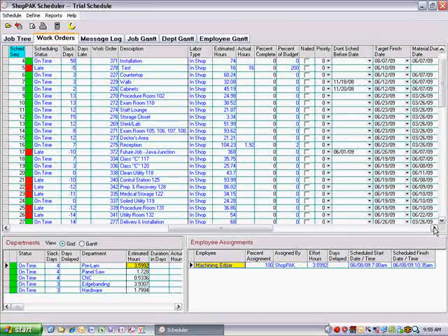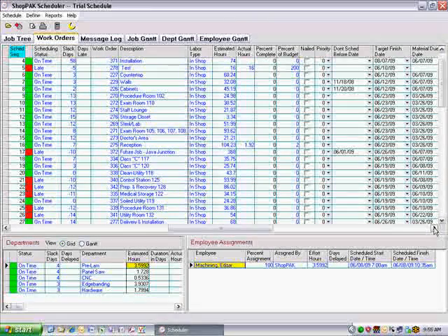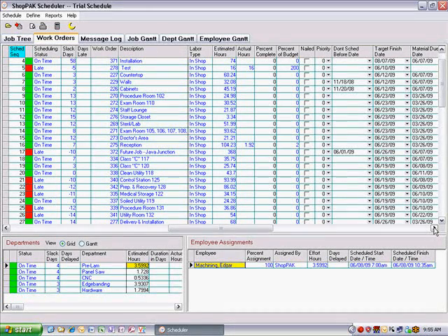Both target finish date and priority influence how the scheduler automatically sequences work orders. Thus, adjusting these fields allows you to indirectly influence work order scheduling position. However, you can directly arrange work order scheduling position. Many times this is faster than changing target finish date and/or priority because you simply assign an explicit scheduling position to a work order. Once you manually adjust work order scheduling sequence, the scheduler stops auto-sequencing and instead uses the explicit sequence number you've given to each work order.